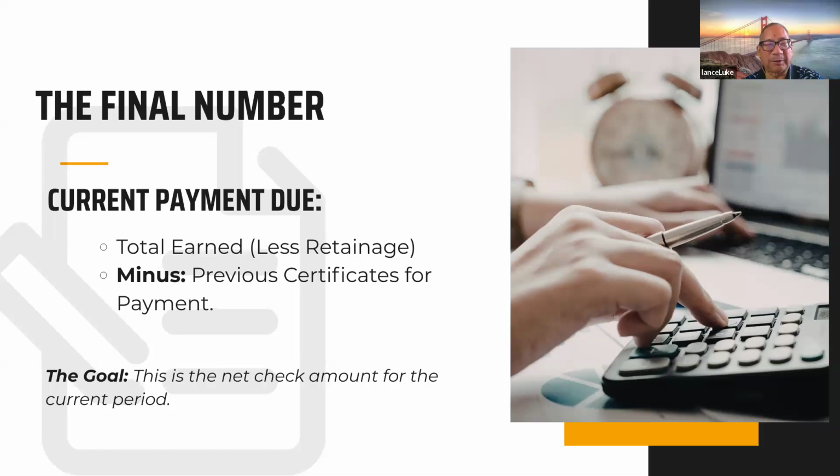So if there's a construction lender involved, the check would be for $90,000, not $100,000. Okay. If there's no construction lender and the developer is just paying cash, right? It'll still be $90,000 because it's $100,000 less 10,000, which is the retention. All right, next slide.